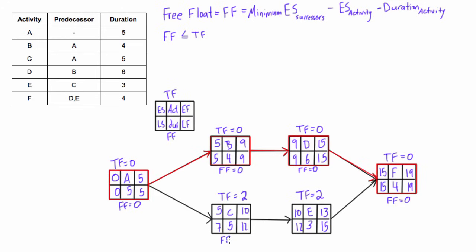For activity C: 10 minus 5 minus 5 gives a free float of zero. For activity E: 15 minus 10 minus 3 gives a free float of two.